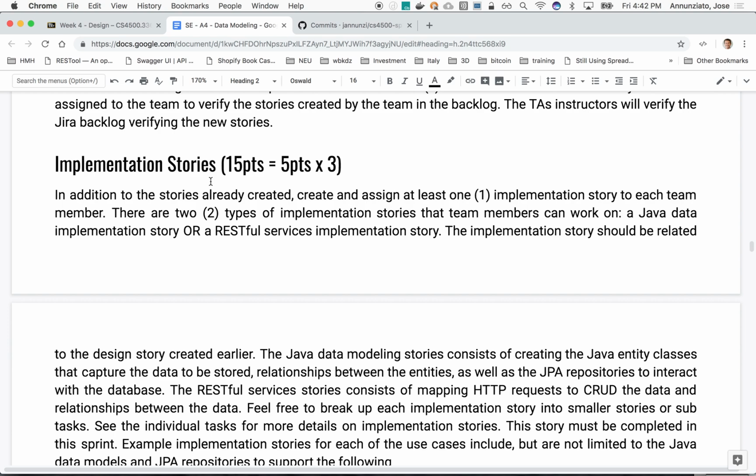Again, I am being your project manager, but more and more, you will be the project manager and decide what to work on next. I'm forcing these because there are some dependencies as the project progresses that need to exist for later modules to make sense. Next week we'll do some React, and React is going to need some services to consume some data to draw something on the screen. So ideally these things will be in place by the time we get to React. There are some dependencies that I already have in mind, and the assignments bear that out.